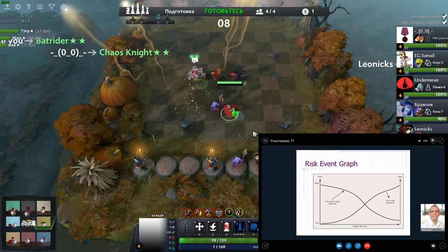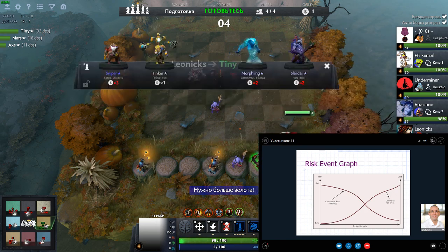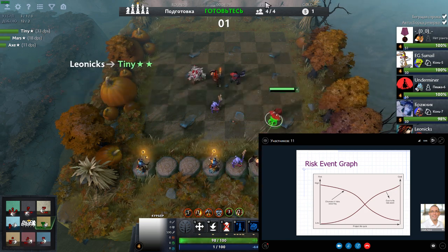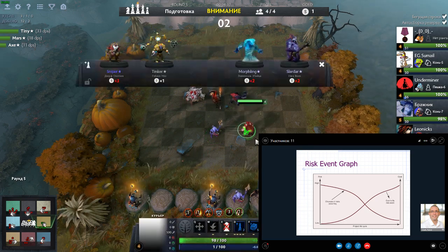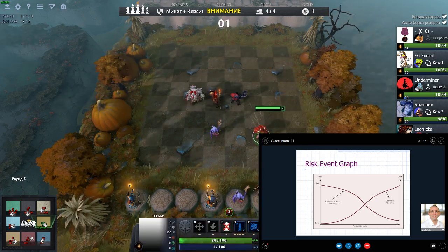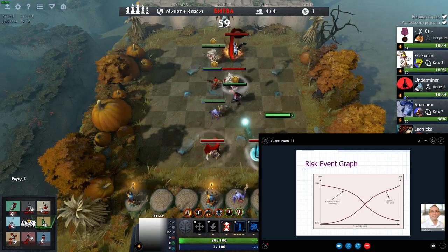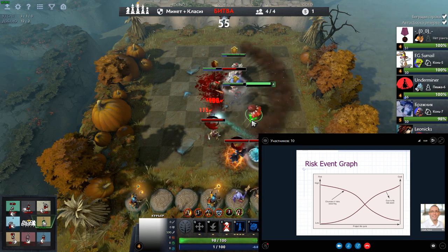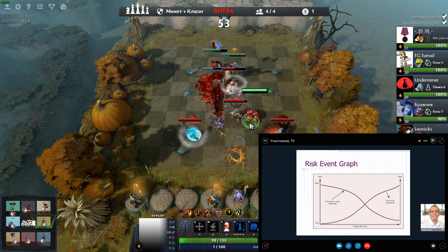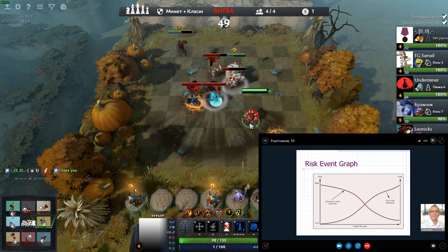So if we look at this graph here, what this is showing us, one line is relating to risk and the other line is relating to cost. And the timeline is the horizontal axis. So you can see the chances of risks occurring is usually pretty high at the start of the project. And if we manage them well and the project is well defined, they should decrease and diminish as the project goes on.